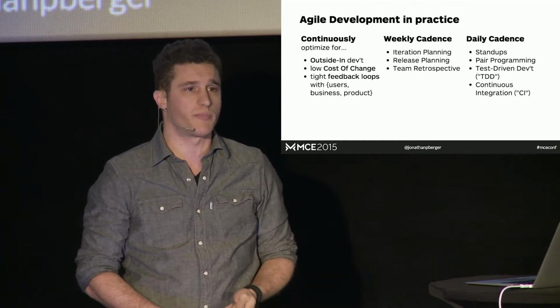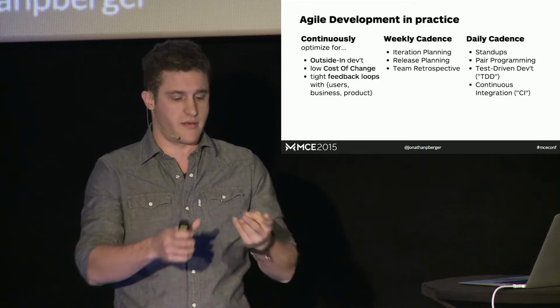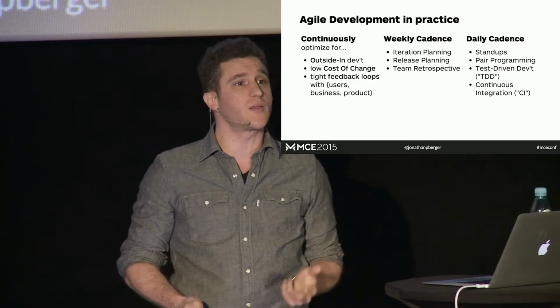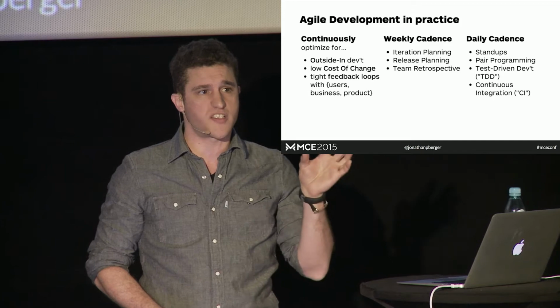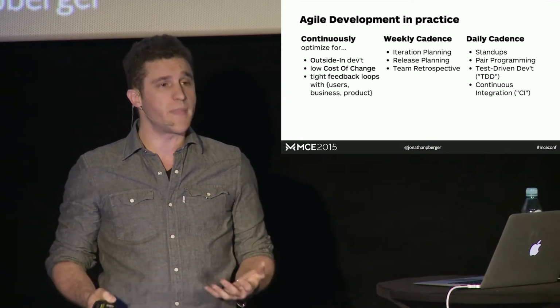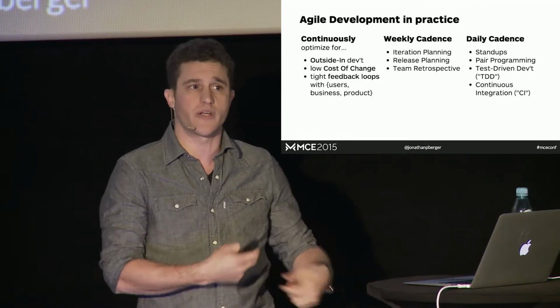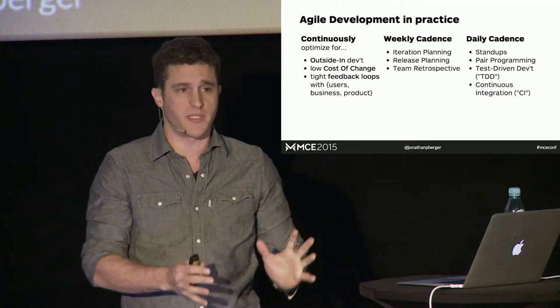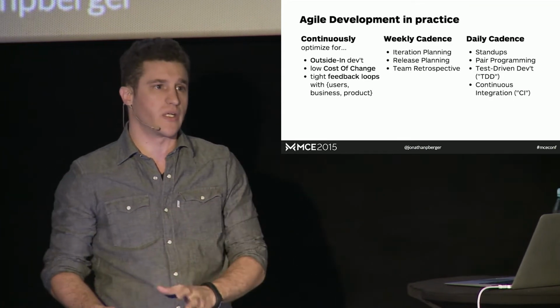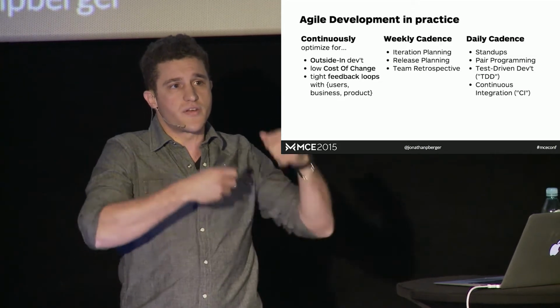We're trying to optimize for low cost of change, right? In the old world, when we're building, engineering comes from bridges and pyramids and stealth bombers. We're building with atoms and not bits. And the cost of planning and the cost of building are orders of magnitude different. So it makes sense to plan up front. You plan as a distinct phase. And when you're done with your cheaper planning, you have your plan and then you give it over to build, right? Maybe that means design and engineering and testing, whatever. But there's this handoff process.